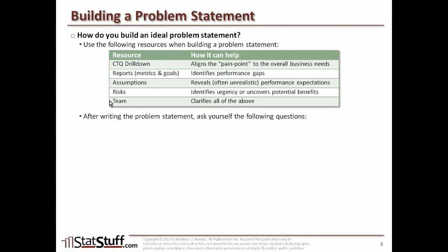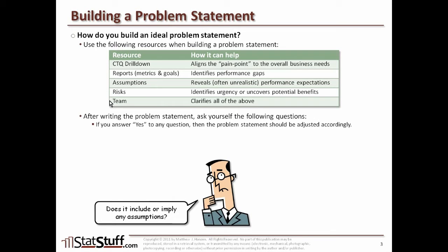After you've written your problem statement, there are a few things I recommend that you ask yourself. For these different questions, if you answer yes, then you need to go back and adjust your problem statement. If you can answer no, then you probably have a good problem statement. First, you might ask yourself: does the problem statement include or imply any assumptions? If so, you probably need to go back and fix it. This is different from key assumptions you're using to help identify the pain point — but if there are any other assumptions that are kind of implied, those should definitely be removed.